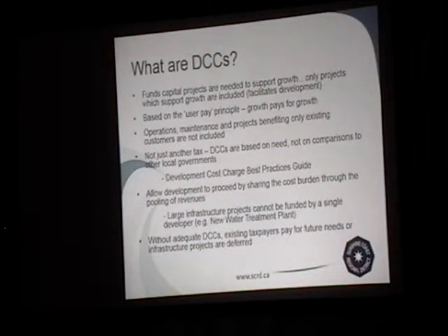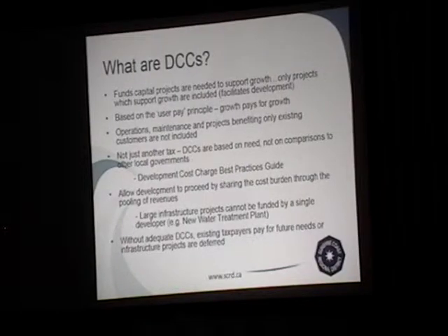And a big thing is it allows development to proceed. So DCCs help facilitate development. They're not a hindrance to development, they actually help facilitate it, because it basically takes the cost burden, it allows us to pool the revenue, so that, say a small developer came in and we needed to fund a water treatment plant. No way could a small development actually contribute the $6 million we need to develop a new water treatment plant.